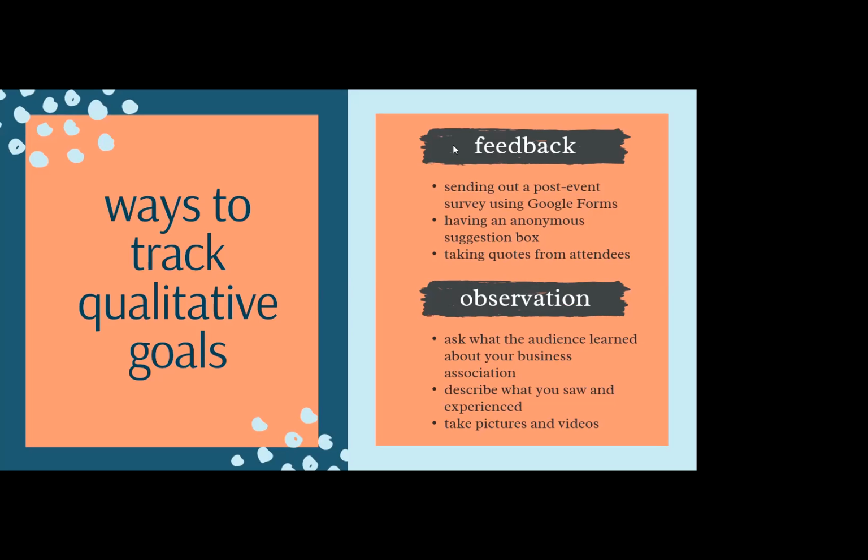As you just said. Yes. And the verbals, and have somebody taking notes and bringing back all the things they heard while it's still fresh. Because sometimes we have not done that in rooms that I've been in, and a year later you're trying to remember the notes. Who said that, what do we need? Oh yeah, hand sanitizer, because the person needed to move the trash can and then pour beer again. Right. Impressions, super big. Yes, it's super important to have those debriefs too.